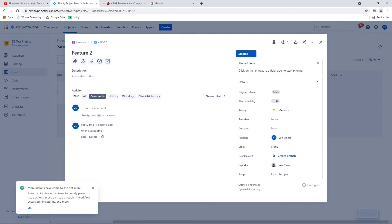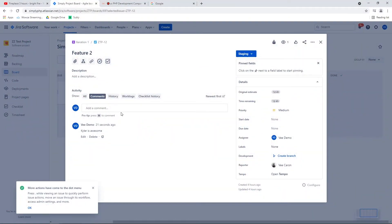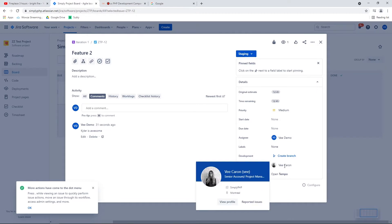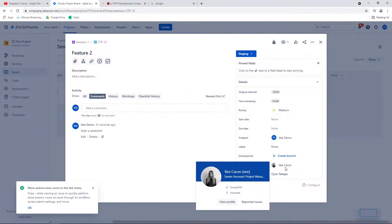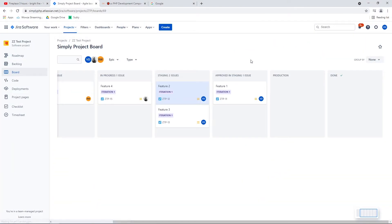So basically if I go and test and say it looks good except there's one little thing, or it doesn't work at all — then you put your notes and comments there. They can say 'approved in staging,' and we keep a very close eye. In the morning we check what was approved in staging, or the client will mention it in our conversations. When we know it's approved in staging, we drag and drop that ticket over to the 'approved in staging' column. That is a signal that we're ready to schedule a date to deploy those features to the production environment.